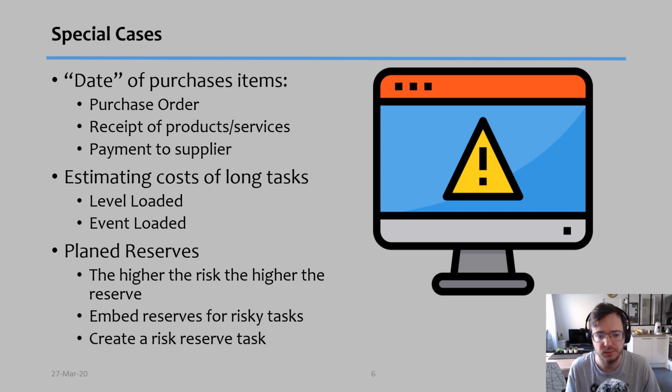Now, obviously, this is a good technique as well. Based on this one, what I do is I focus more on the milestones of the task itself. So, for example, I only register the cost the moment the task is complete. When do I plan to complete that task, for example?